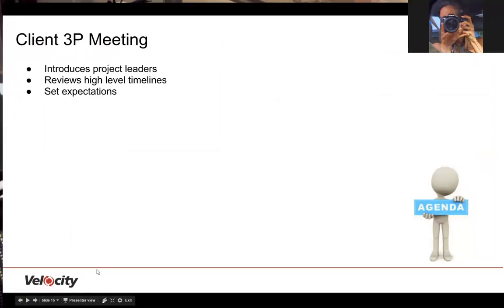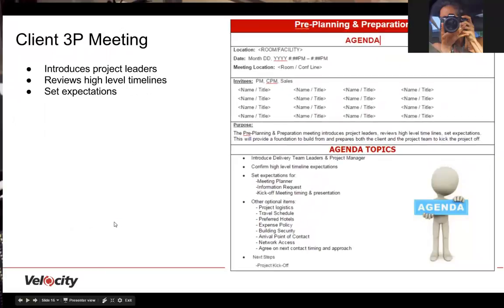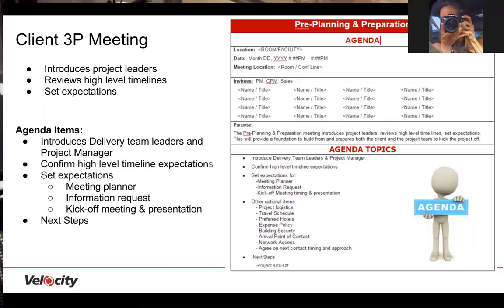The Client 3P meeting is the fourth communication milestone. This forum introduces project leaders, reviews high-level timelines, milestones, and it sets expectations. The meeting provides a foundation to build from. Agenda items include introducing the delivery team leaders and project manager, confirming high-level timeline expectations, setting expectations like meeting planner, information requests, kickoff meeting and presentation, as well as next steps.